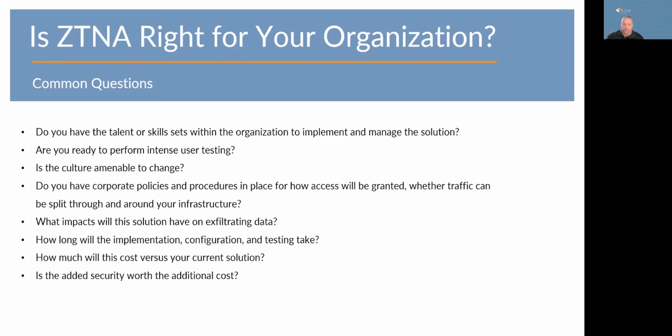And one of the things that will normally be asked is, how much better is this? How much more secure are we, or will we be? And that is a very difficult, if not sometimes impossible, thing to quantify. So don't just look at it as, my current solution costs me $1 million a year, and this solution is $1.1 million, it's basically the same, no problem. And then forget that you had $1 million in other costs that were upfront during implementation.